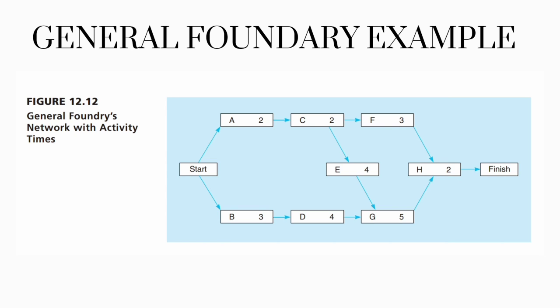For example, if Harkey wants to reduce the project completion time by an additional 2 weeks, both paths must be reduced. This can be done by reducing activity G, which is on both critical paths, by 2 weeks for an additional $2,000 per week. The total completion time would be 12 weeks, and the total crashing cost would be $5,000: $1,000 to reduce activity A by 1 week and $4,000 to reduce activity G by 2 weeks.